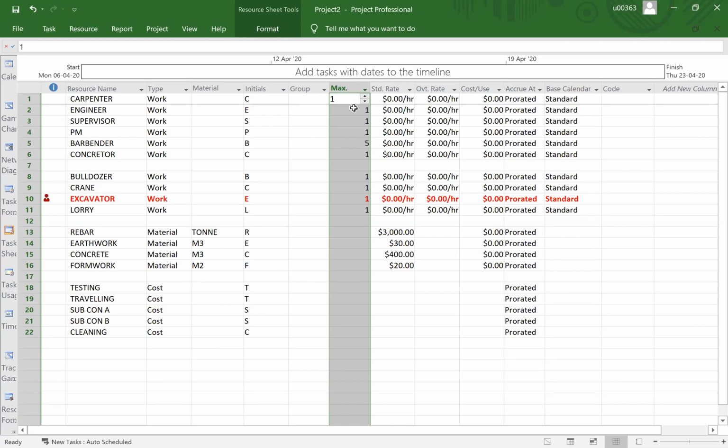That is the scenario where you basically need to either increase the resources or do some kind of rescheduling. Rescheduling meaning you need to push certain activities forward a little bit in order not to put a strain on your resources. So that will be the indicator, which is good.